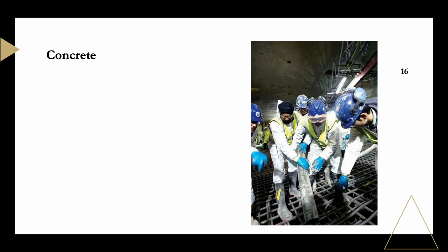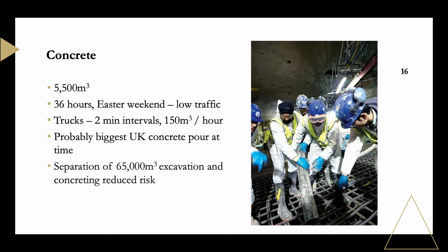Site congestion constraints were exemplified by the pour. Remarkably, 5,500 cubic metres of concrete was poured over a 36-hour Easter weekend when there was less traffic. Separation of the 65,000 cubic metres of excavation and concreting also de-risked that part of the project, involving 25,000 man-hours without a single accident.